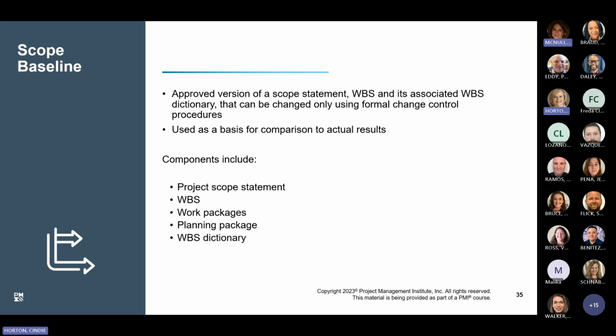So, to re-paraphrase all that, your scope baseline can be preliminarily set, but once you start talking about schedule and costs, you might find that there are some things in your scope that may need to change. That's why your preliminary scope baseline can be preliminary, but when it all comes down, all three of them are going to be solidified and agreed to at the same time. And then any changes that have to happen have to go through the change management process.